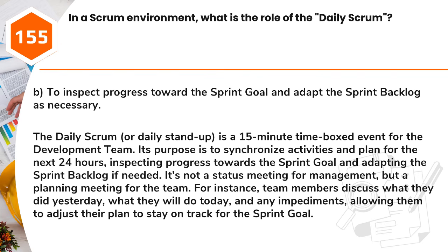The daily Scrum, or daily stand-up, is a 15-minute time-boxed event for the development team. Its purpose is to synchronize activities and plan for the next 24 hours, inspecting progress towards the sprint goal and adapting the sprint backlog if needed. It's not a status meeting for management, but a planning meeting for the team.